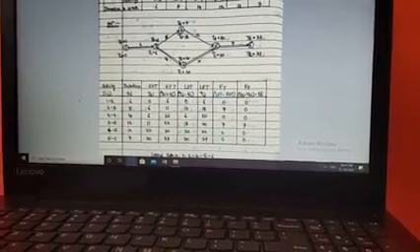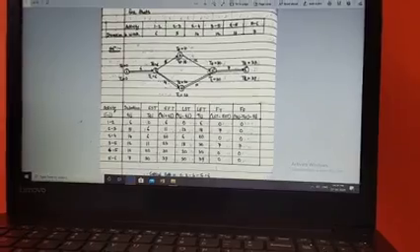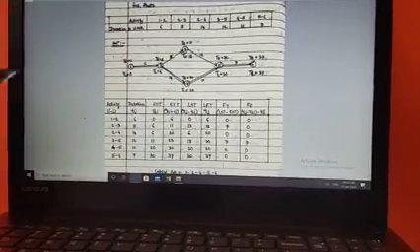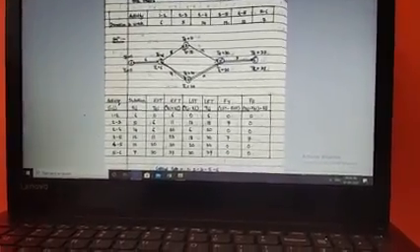So with this, now quickly let us go for the next parameter, LST. What do you mean by LST? As I have already said, the long form of LST is latest start time. The beauty of this particular calculation method is that here we have to start our calculation in reverse manner. Again I repeat, to calculate LST as one of the parameters, we have to come in reverse way.